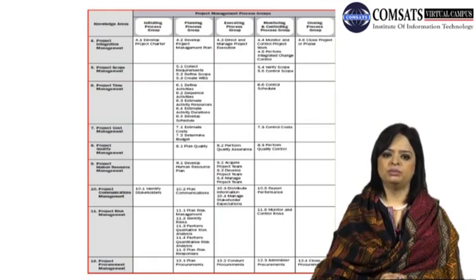A little bit of relationship between what was told. Every process or every phase has a tangible piece of documentation that can be signed off, and charter is that sign off or tangible piece of documentation in the initiation phase of the project. And then identification of stakeholders sometimes may or may not be part of the project charter itself. So only two processes out of those 42 processes are in the initiation process.